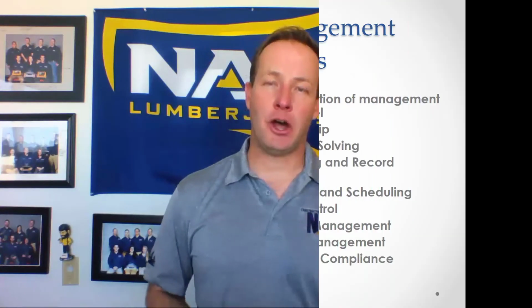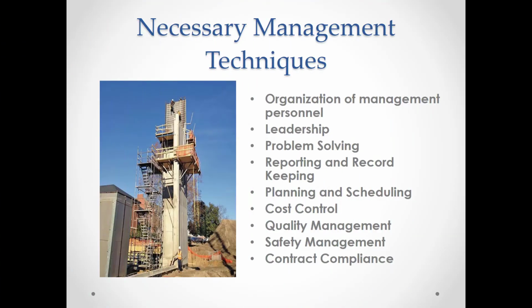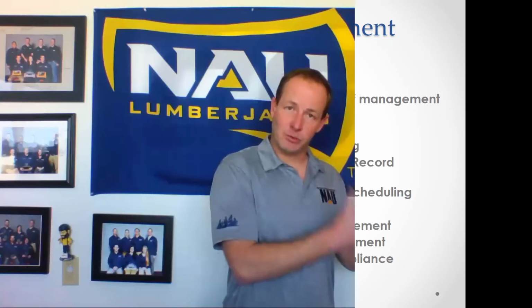And then lastly, contract compliance. So contract compliance has to do with all of those subcontracts that are written on the job. Now, the project manager might actually write those subcontracts, but the superintendent is the person that's actually putting those things in place and needs to know those contracts if they're going to manage the subcontractors and the trade partners.